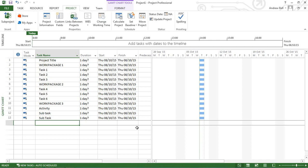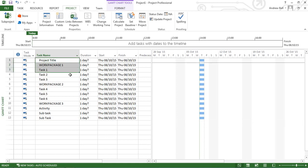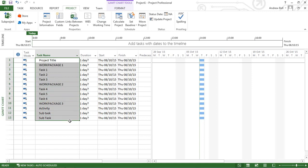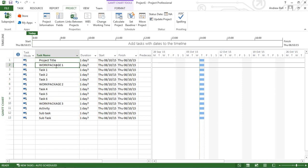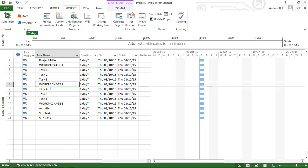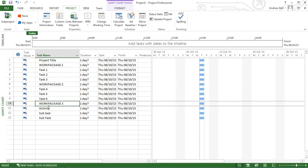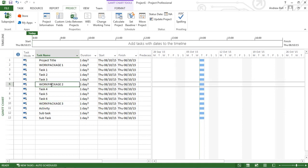So here in Microsoft Project 2013, I've switched all my tasks to be automatically scheduled and typed in this task list. Now, as I was typing the task list, I put the work packages in capital letters. This is how I can find them later. It's rather easy for me to find them in this exercise, but in a real project, you can identify what you mean as a work package by the capital letters.